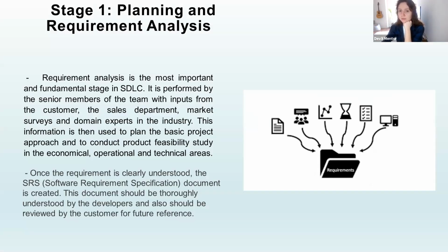So let's start with the first stage, which is planning and requirement analysis. Requirement analysis is the most important and fundamental stage of SDLC. It's performed by the senior members of the team with the inputs from the customer, the sales department, market surveys, and domain experts in the industry. This information is then used to plan the basic project approach and to conduct product feasibility study in the economic, operational, and technical areas.